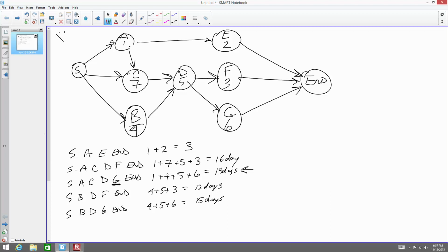And for this particular question, which of the following fee structures is a specific sum paid to the engineer for each day spent on site? Per diem fee. And per diem means a daily fee. So if I'm on the job site, every day I'm on the job site, I get $1,000. Every day I bill them, I get $1,000. Regardless of what I did, if I'm on the job, on the site, doing what I need to be doing.